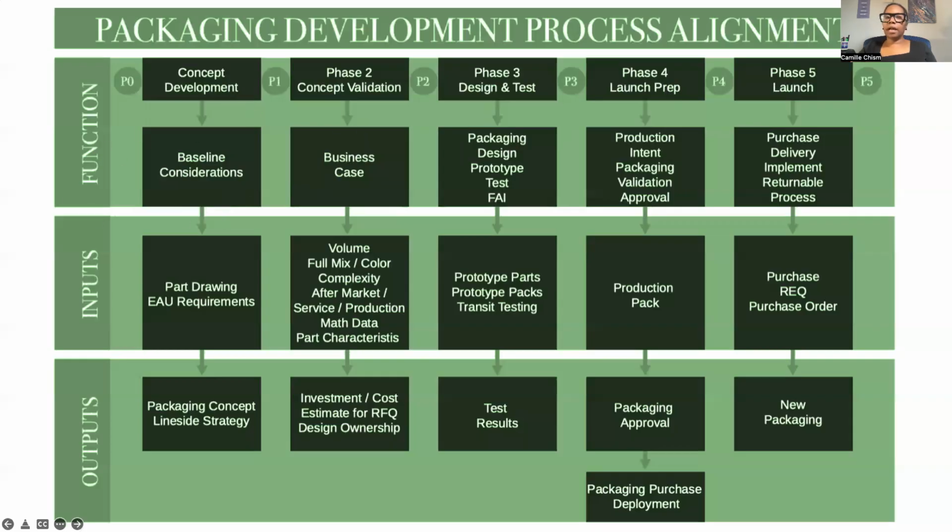A couple things I wanted to mention. I mentioned what those gates are, that they're decision points. The phases occur between those gates that are shown with the circles, but they again have specific activities. That's where I talked about your functions, your inputs and your outputs. All these are really pieces of information or activities. They will all have timing associated with them.